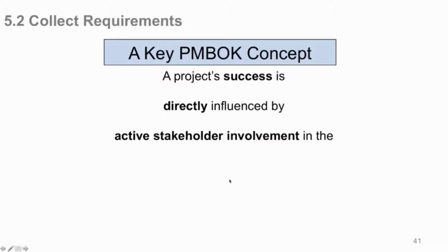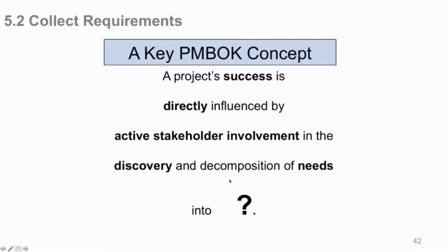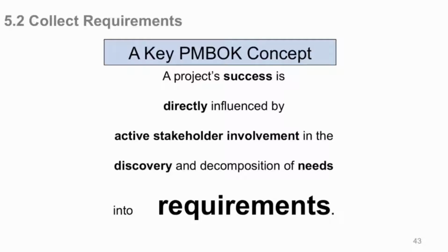Here's a key PMBOK concept. Project success is directly influenced by active stakeholder involvement in the discovery and decomposition of needs into requirements. So a key concept, project success is based on stakeholders discovering their needs and breaking them down into requirements. Your stakeholder, they're not going to give you 100 work items. They're going to give you main items. You need to break those down into the individual work items that will produce that requirement.